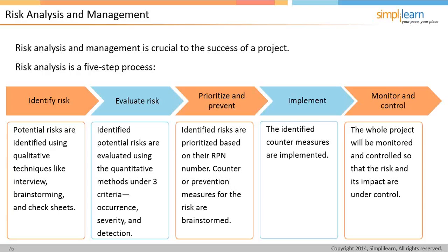on. So the risk analysis and management is going to be obviously crucial to the successful project. And it's really a 5-step process. So you're going to identify the risk, you're going to evaluate it, you're going to prioritize and prevent, you're going to implement, monitor, and control.